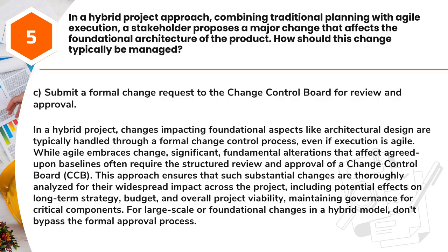Answer: C. Submit a formal change request to the Change Control Board for review and approval. In a hybrid project, changes impacting foundational aspects like architectural design are typically handled through a formal change control process, even if execution is agile. While Agile embraces change, significant, fundamental alterations that affect agreed-upon baselines often require the structured review and approval of a